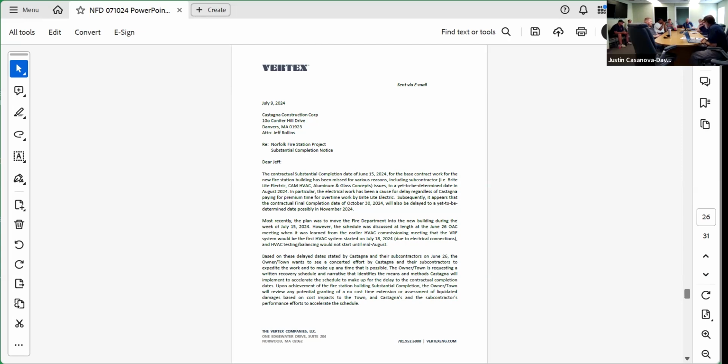Well, there are definitely planting limits, seasonal limits when you can plant and when it's recommended not to. I've seen a lot of times where the contractor will still plant, and they basically say, whatever doesn't take, we'll just redo in the spring. So I leave that as a means and methods to them, but I wouldn't give them a stop work order for that. I would leave that up to them and their landscaping contractor. Because we'd certainly want to get as much done as possible. Will they have to come back for something? Most likely. They may have had to anyways. Even if they planted in October, something didn't take, they have to come back.